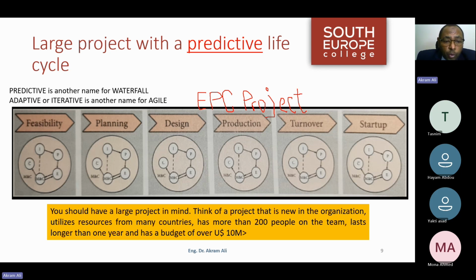So now if I approve the planning phase of the project, the first thing is I have initiation of the planning phase. And like we said, when we say initiation, it means a project charter, and a project charter will nominate a project manager and will suggest a budget.